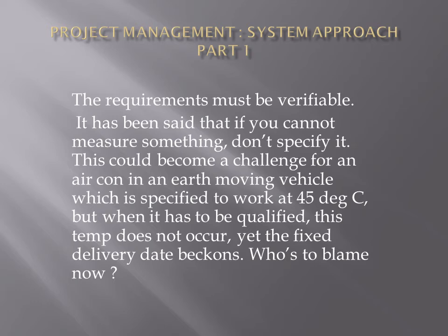The requirement must be verifiable. It has been said that if you cannot measure something, don't specify it. This could become a challenge for an aircon in an earth-moving vehicle, which is specified to work at 45 degrees centigrade. But when it has to be qualified, this temperature does not occur.